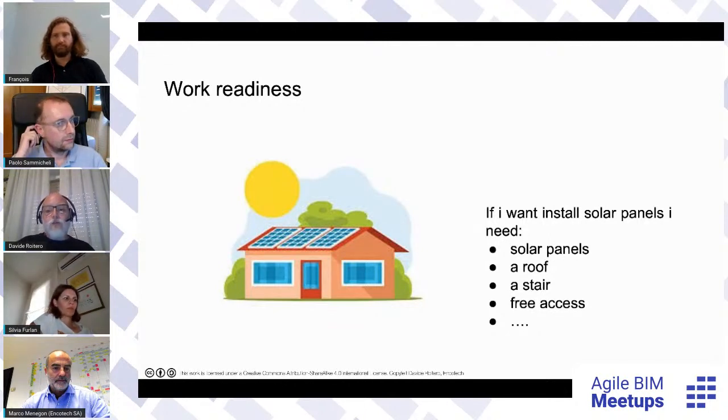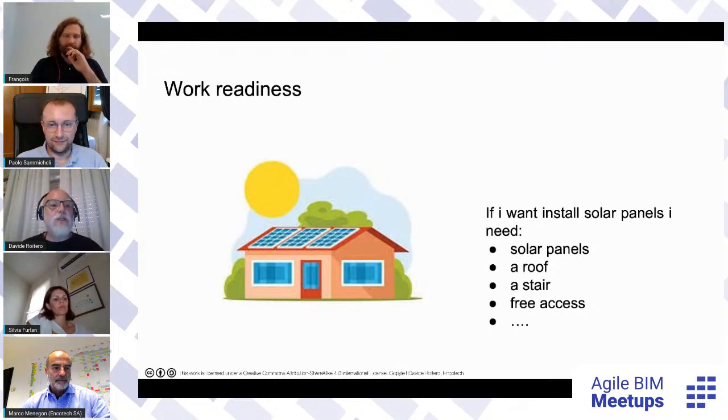The work of the product owner has increased, obviously. It increased a lot. But the number of story points per sprint has also started to run, because if all the backlog is ready, the team can work rapidly and can go running.